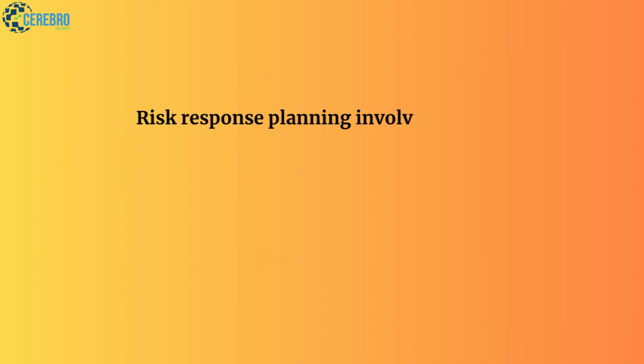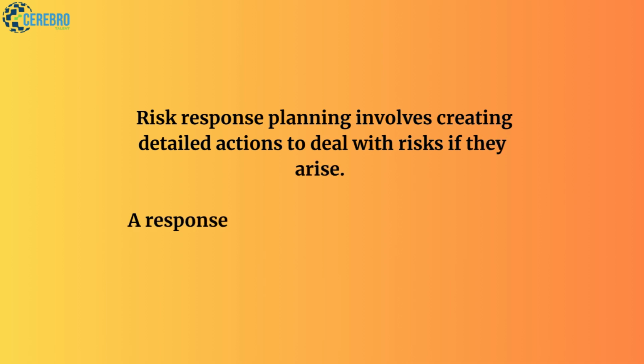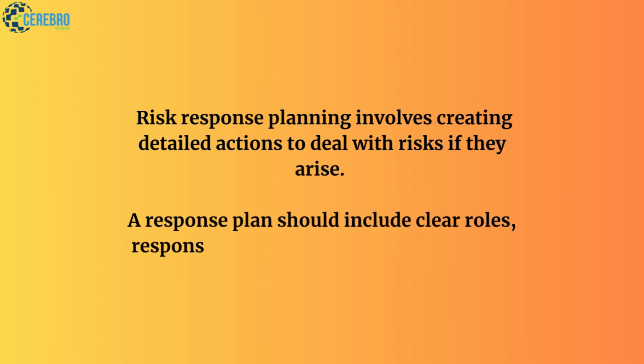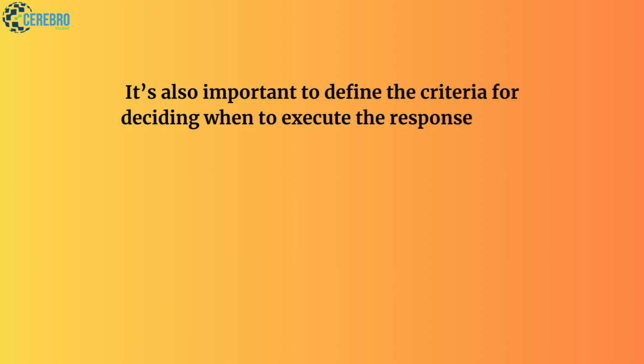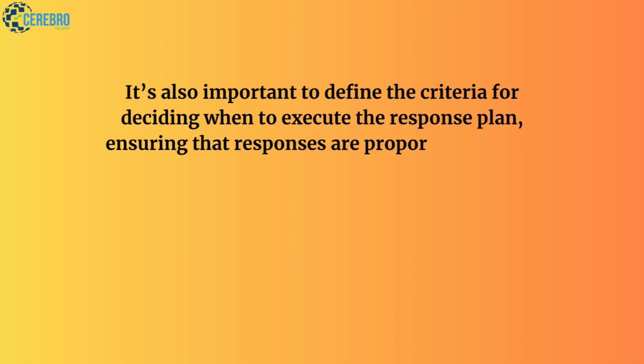Risk response planning involves creating detailed actions to deal with risks if they arise. A response plan should include clear roles, responsibilities, and timelines for action. It's also important to define the criteria for deciding when to execute the response plan, ensuring that responses are proportional to the risk's severity.